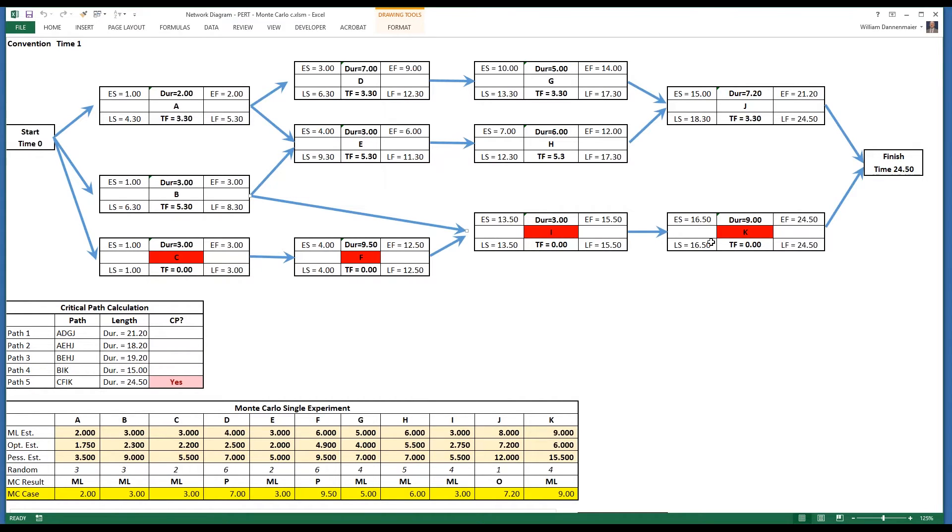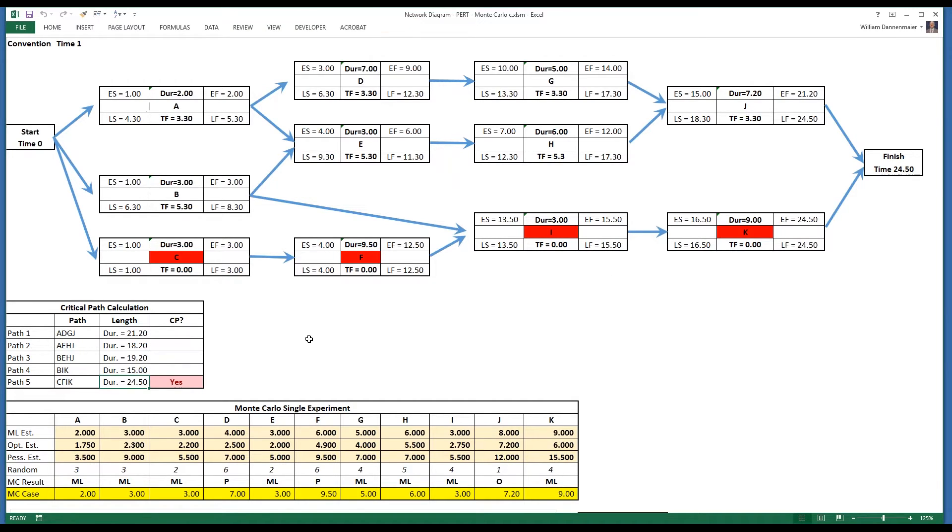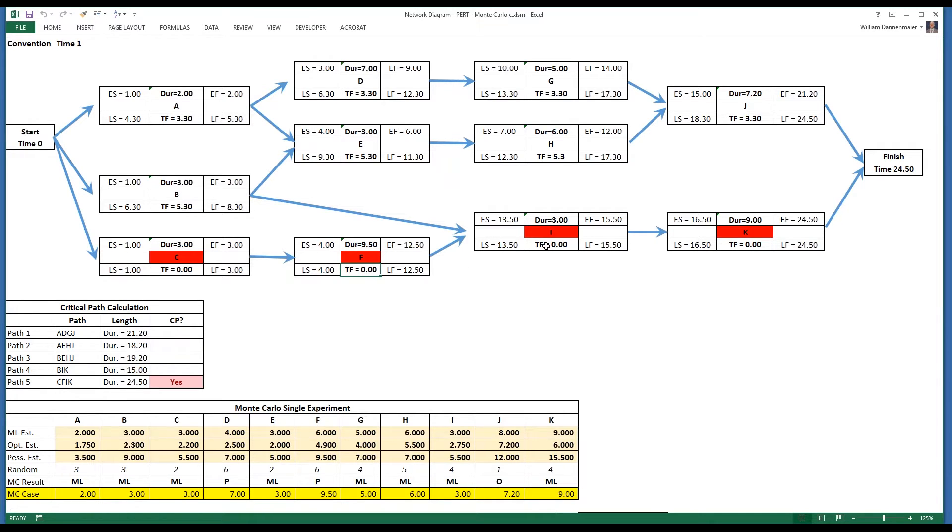The network diagram is displayed with a critical path of the tasks in red. In this case, C, F, I, and K are the critical path that represents the longest path in the network in terms of duration. Notice that it's 24.5, the shortest time in which the project can be completed, and the path with the least or zero total float. Notice the total float is zero for each of these tasks.